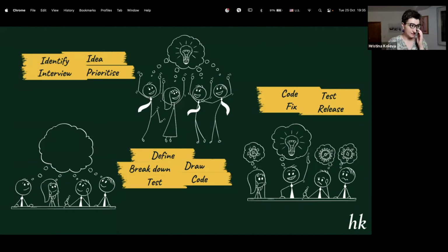And the next step was to write a technical solution document. Again, this is how I'm going to implement it. It works for a small story, it works for a bigger story, it doesn't matter. The thing is that you have documented knowledge and implementation considerations that your fellow teammates will be able to review and give you feedback. So that was the next step.